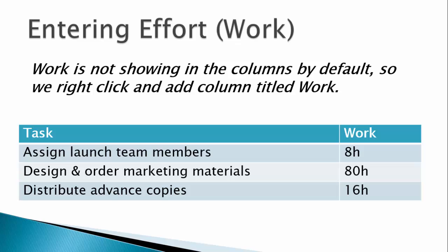By default, there is not a column to input the effort estimates. In MS Project terminology, effort is called work. You can go to the far right of the input table or right-click on the table header to get the opportunity to add the work column. Once you've added the column, you can go ahead and enter the values for just the tasks shown on this chart.